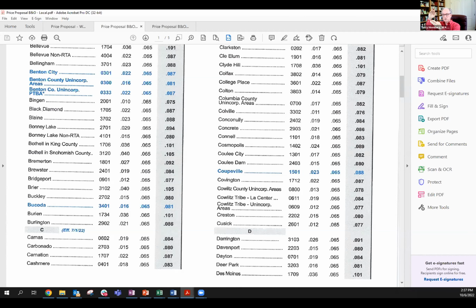So if you had a 5% profit, you are now shrinking your profit because you have to pay these taxes. Well, the same thing applies to your indirect costs. So many companies put in the cost to do the work, which is direct costs, labor, materials, and equipment, and they mark it up with profit, 10% profit, and probably put something in there for their liability insurance and submit it. Okay, so, because they didn't know how to compute indirect costs, or they don't know what it is.